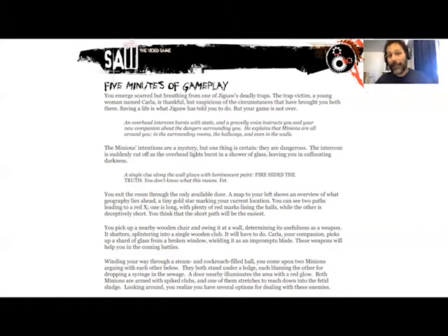and have everyone write it out themselves separately and then come together, look at those comparisons, see where you might not be in alignment on your ideas. Or you can get together as a team, have one person type it, but you're all contributing together. Once again, this is not a bullet pointed list of what happens in the first 5 minutes, because then you're not thinking through all the fine details of what happens moment to moment of the experience. The whole point of the 5 minutes is you're thinking about moment to moment experiences.